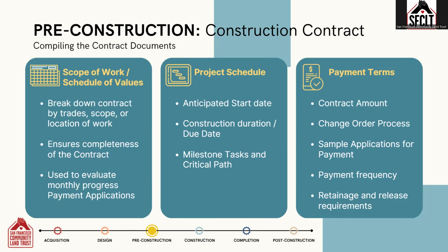For very complex projects, the contractor should provide a detailed schedule in Gantt form, showing start and end dates for each trade and area of work, particularly those areas that have an impact on the residents.